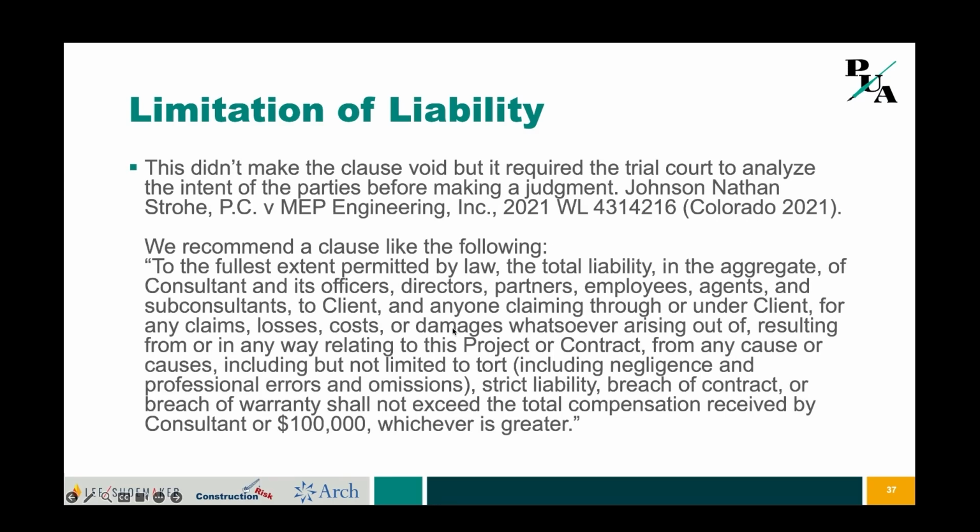Another concept within a limitation of liability, we often see design professionals limit their liability to their professional liability insurance. I'm sure everyone who's on this program understands how your professional liability insurance operates, but let's say hypothetically you have a $1 million policy and you spent $200,000 defending against the claim. You really only have $800,000 left to settle the claim or pay a judgment at that point in time.